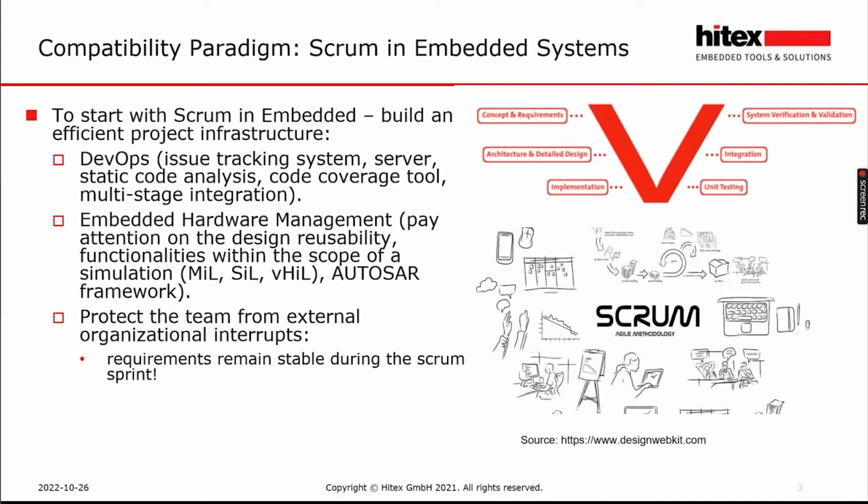You can always make changes in your requirements, prepare the change requests and any other supporting documentation, but only after the end of the sprint. Usually sprints are 2 weeks long, so it's not very much time. You can always make any changes in your project after the sprint ends. So please do not make any changes during the sprint. It's really very important. And yeah, keep your team work stable during the sprint period of time.